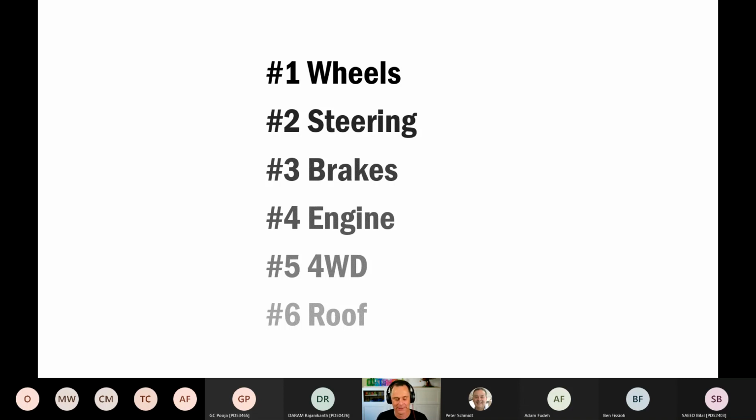So what I've found is if we go high, medium, or low, or use the MoSCoW technique, then stakeholders have a natural inclination to categorize everything as high or everything as a must-have requirement. And the reason that they do that is because history has shown them that these projects run over and phase 2 gets cut. And so there isn't any time to do the medium priority requirements, or the could-have requirements. Those requirements never see the light of day. So stakeholders have been trained to inflate the priority of everything. This technique forces them not to do that, to rank them in order.